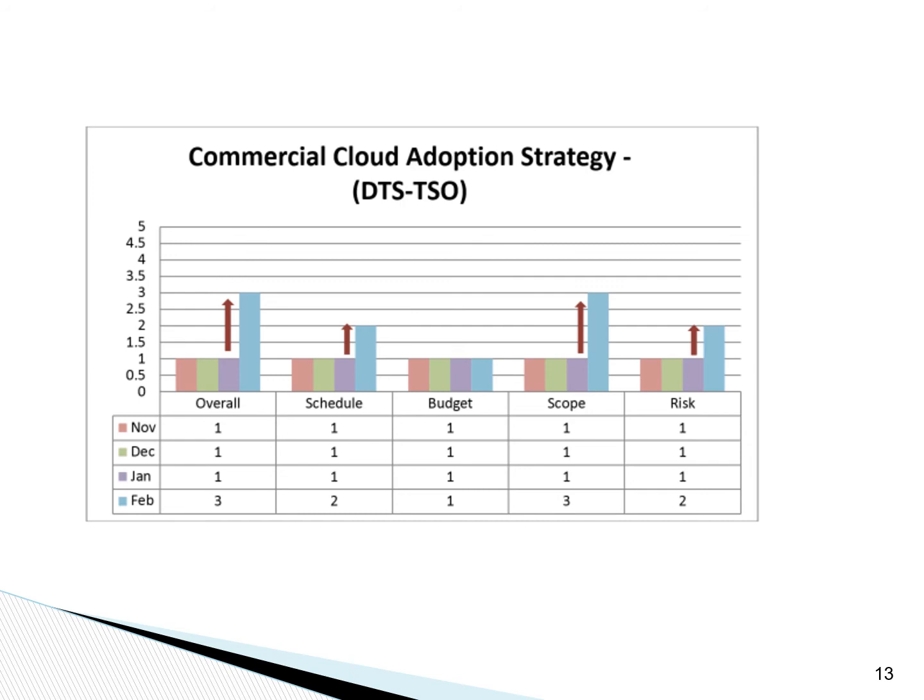For example, this report showed the overall assessment of the project, as well as the assessment of schedule, scope, and risk over previous months. Looking at this trend report, one can easily see if various project outcomes are brought under control or not over time by the project manager when those outcomes get out of the range of acceptable.